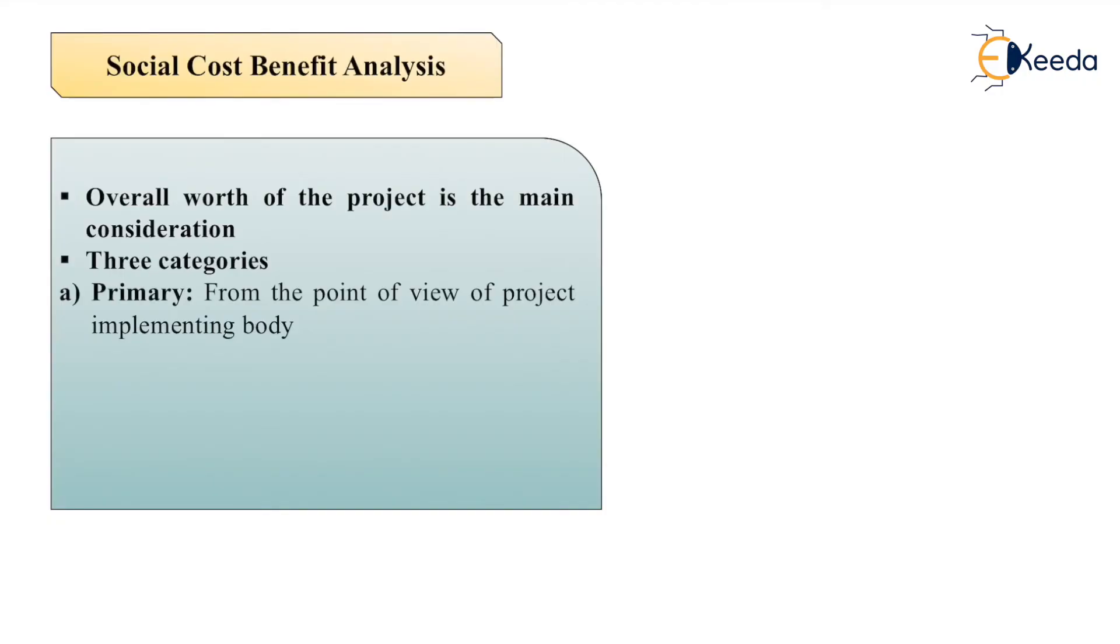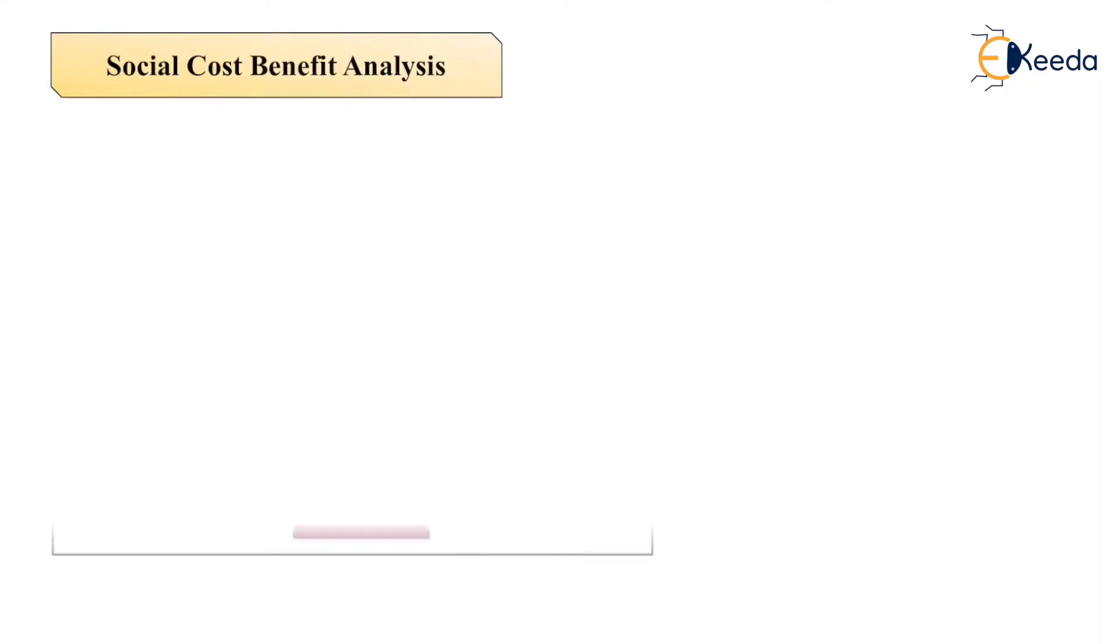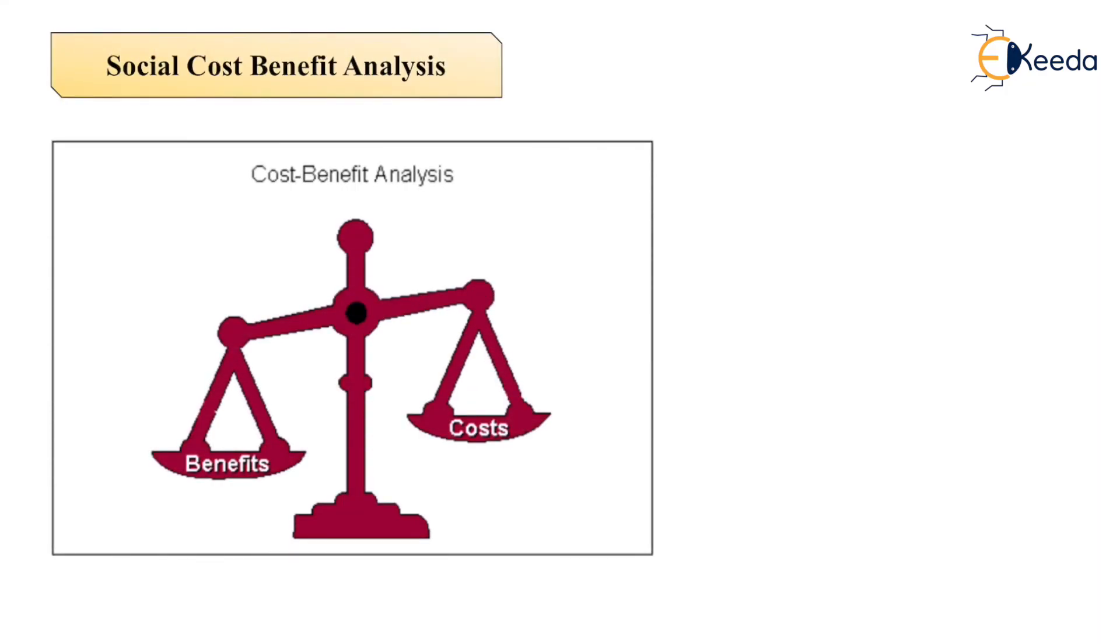Primary means from the point of view of the project implementing body if it is beneficial. Second is apart from the project implementing body, it should be beneficial to others. And last is non-quantifiable spillover. As we can see the benefit and cost, we should go for cost-benefit analysis.